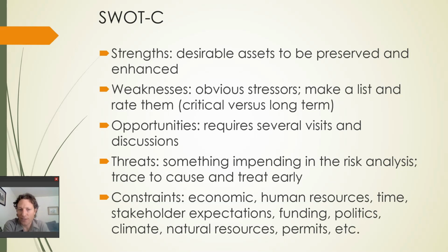Okay, threats. Threats are something impending. It's a high risk in your risk analysis. High probability. You need to trace it to its cause and treat it early. You know, sometimes projects are rolled out in phases, where you do phase 1, 2, and 3 of a project over time. Maybe it takes several summers to really fully implement a restoration project.